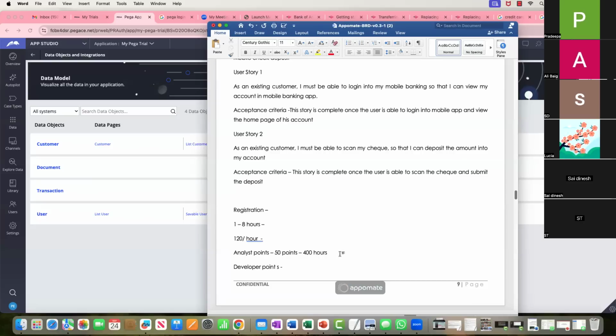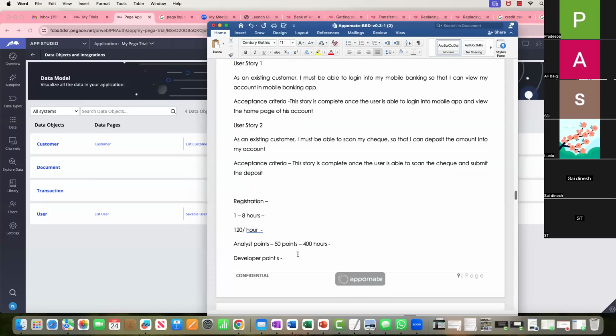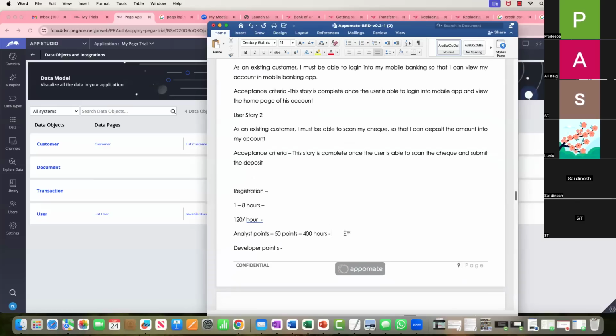According to you, do you think this is more or this is enough? No, that's fine. You tell me from your perspective, then I will give you feedback. So 400 hours into your billing rate of 120, right? Then tell me how much they're going to give you. 48,000 is the right number. What about the developer now? No, it's 48,000, right? Okay, 48,000.